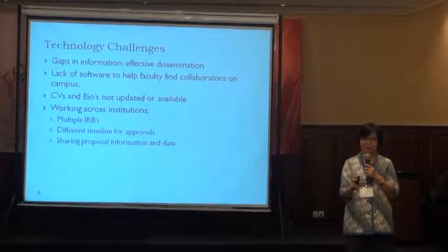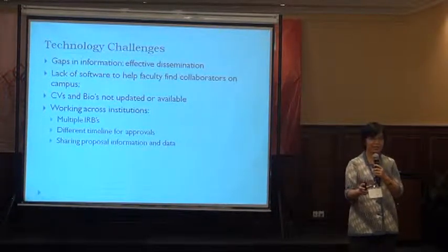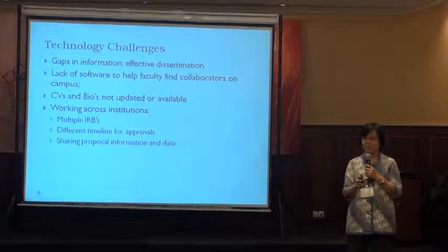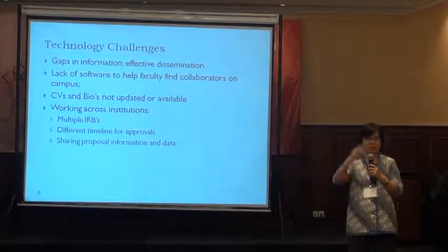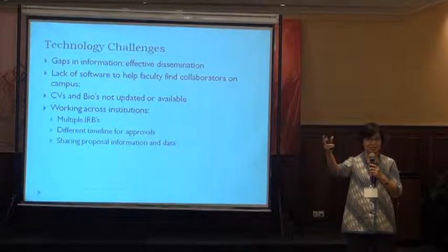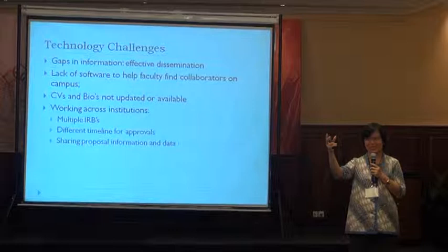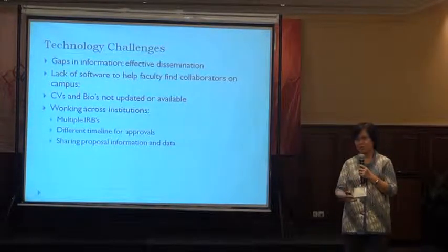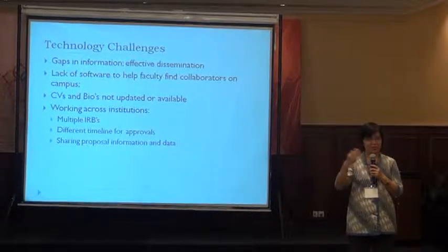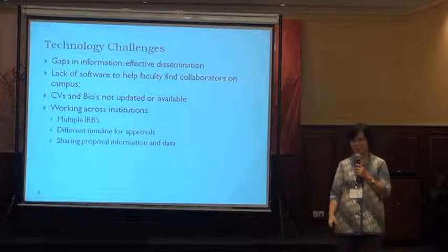And apparently in one of the research this was not done. And this was a research for a PhD student at a university outside Indonesia. So it's really a big problem then, because the research cannot be published, the PhD student also cannot use that. It's a big problem.